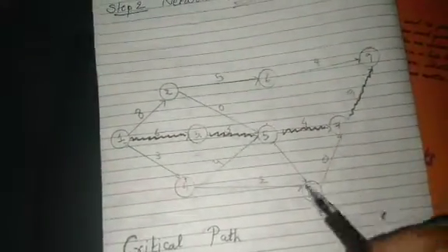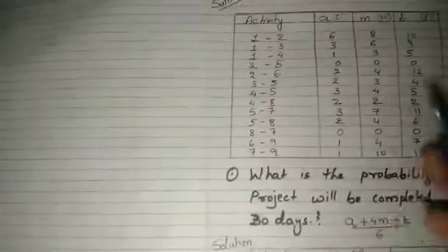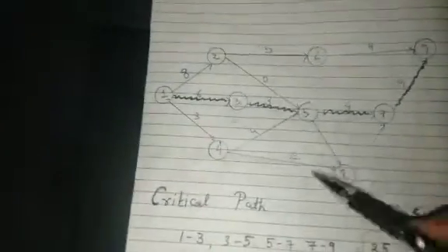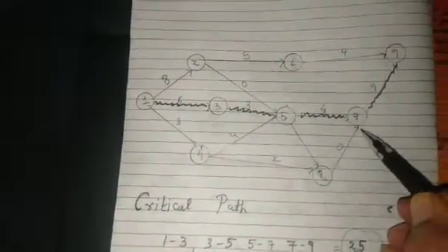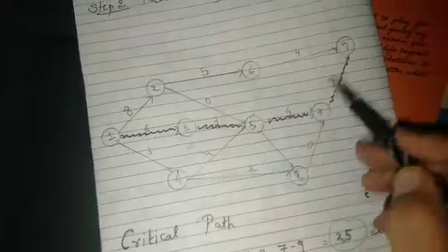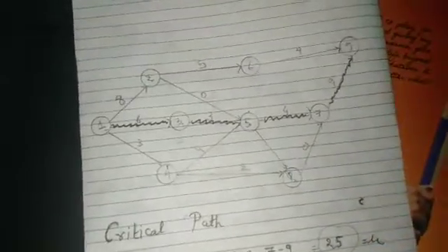Similarly, from fifth activity 7 and 8 both have originated, so you have to just give the network to both of them. After that, from 8th activity 7th activity has originated. So from 8th you have to go to 7th activity. From 6th and 7th activity, new activity 9 has originated. So from merging 6 and 7, your 9th activity has originated.